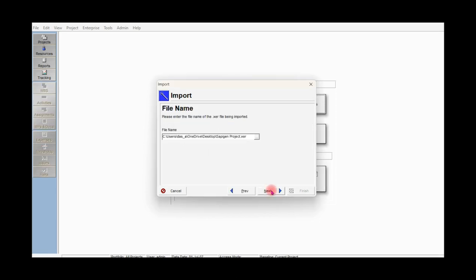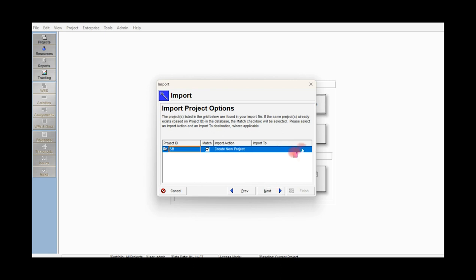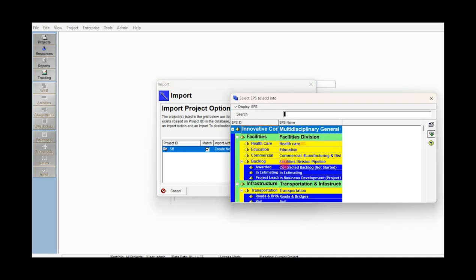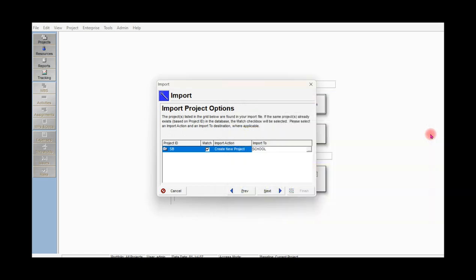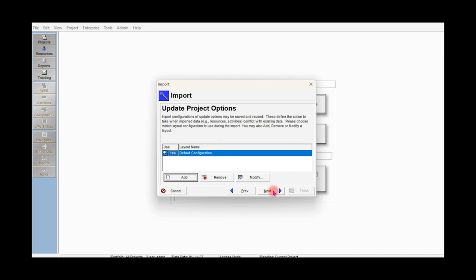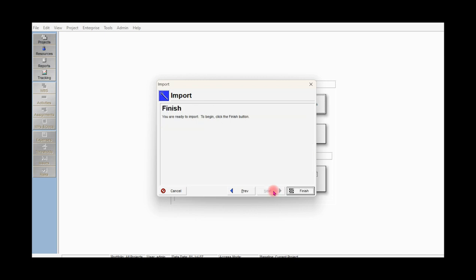In order to import a PM file in XER format from a different location, you must have an EPS node in your P6 file configuration. Then select Import from the drop-down list of File menu. Select PM file in XER format option in Import dialog box and then click Next. Select Project Only in File Type dialog box and then click Next. Browse and select Sapigen.xer you like to import in File Name dialog box. Here you have selected Sapigen XER file to import.